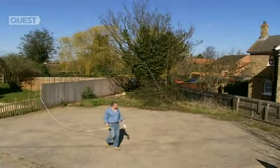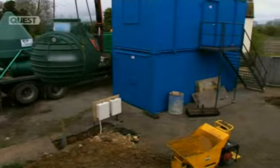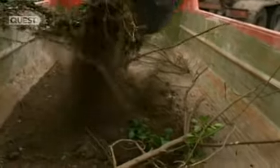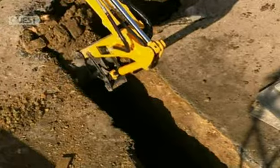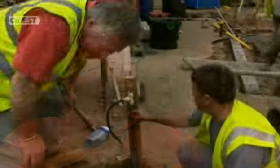Although we did manage to complete our schedule for the first week, we did have a problem with the budget. So there was a bit of success and a bit of a problem. We were supposed to spend about £3,500 to get to that stage, and we ended up spending £5,000. So in the first week, we're already £1,500 behind on our budget on an overspend.